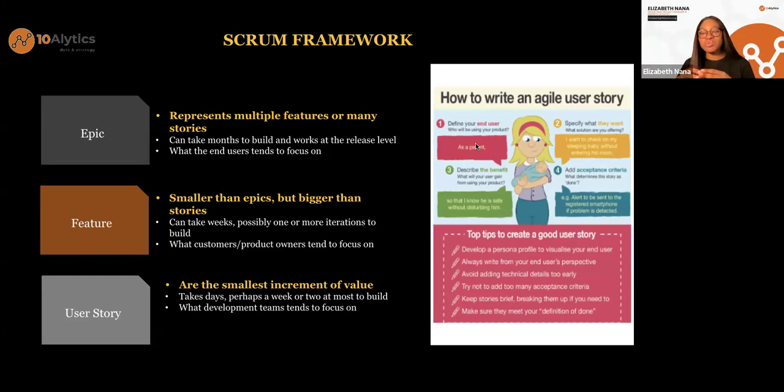So now I've been able to break down the requirements I have gotten from my stakeholders so that the developers know exactly what I want them to do. They know how I want this feature to work. An alert needs to be sent to the registered phone if a problem is detected or if there's motion in the room. Now, the second use of an acceptance criteria is to help with testing.